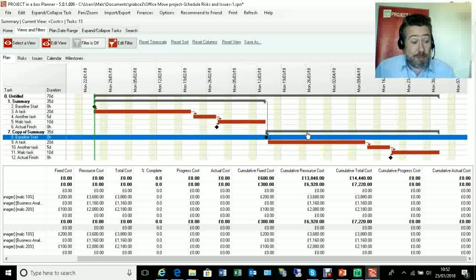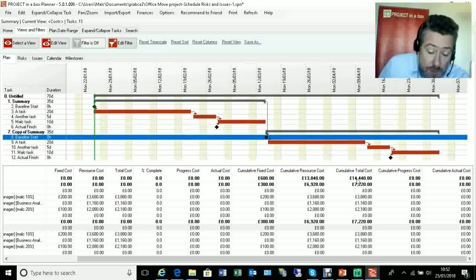So we're building up our project plan now in a much more meaningful way. You'll see it's doubled up the cost because it knows this group was 7,220, so this one's double it. So this is really helpful and quick way actually of laying out and understanding your project, and it forms a really good, in project management terms, what we call a baseline: a definition of what you expect to do on the project against which you're going to compare. As you go through the project, we're going to start marking percentage completes and things like that up on here.